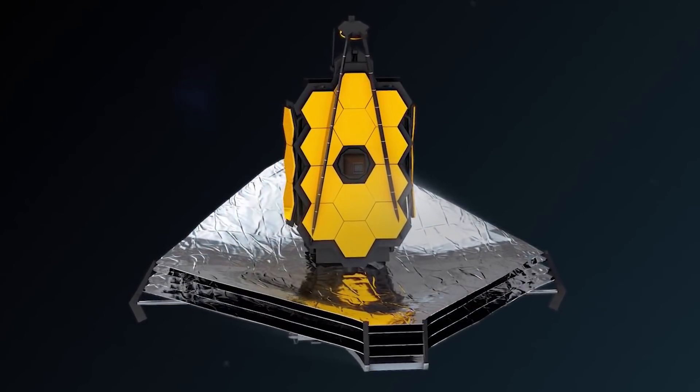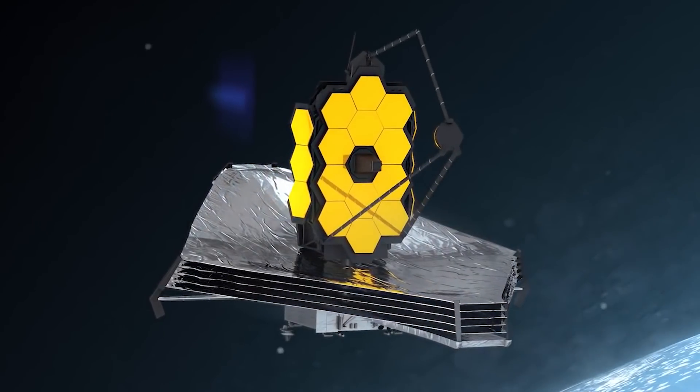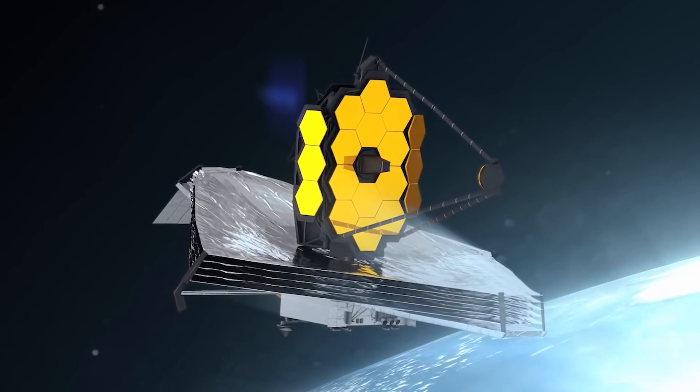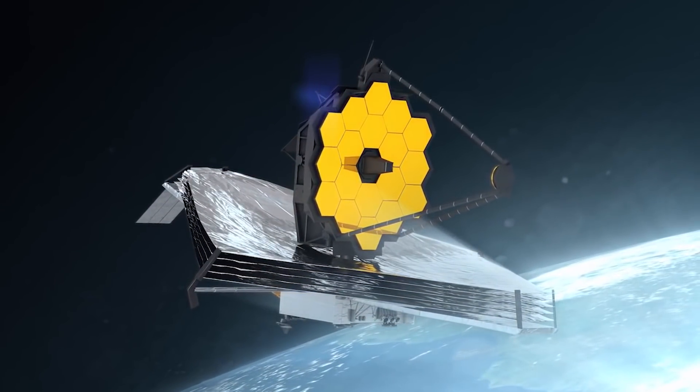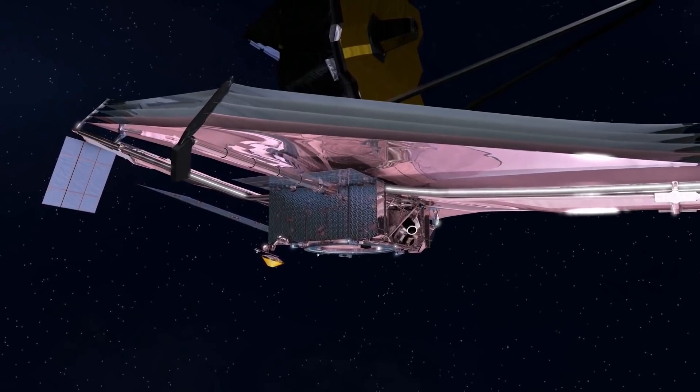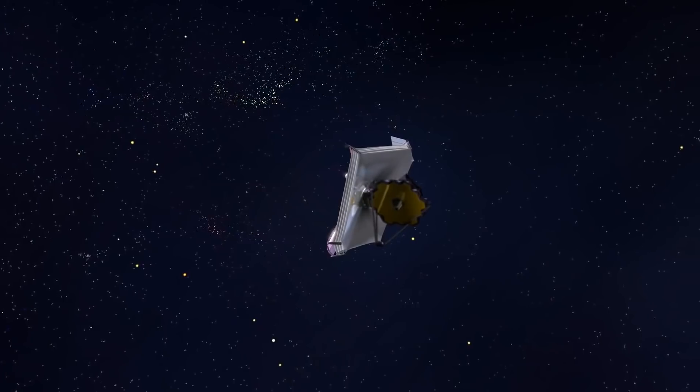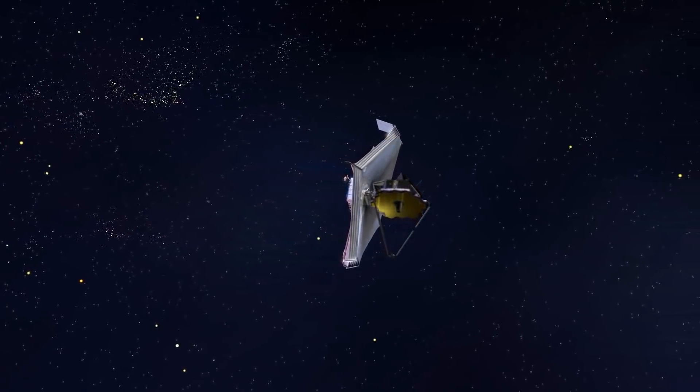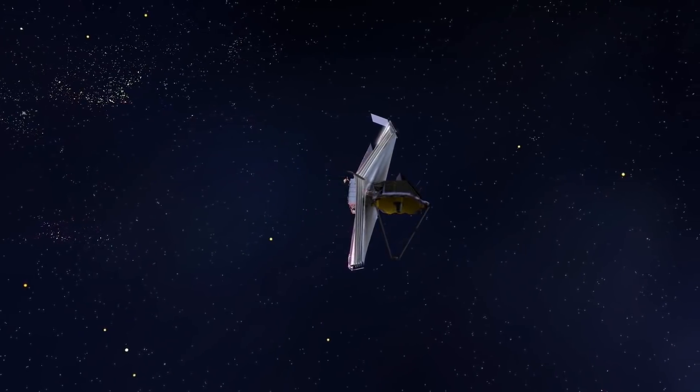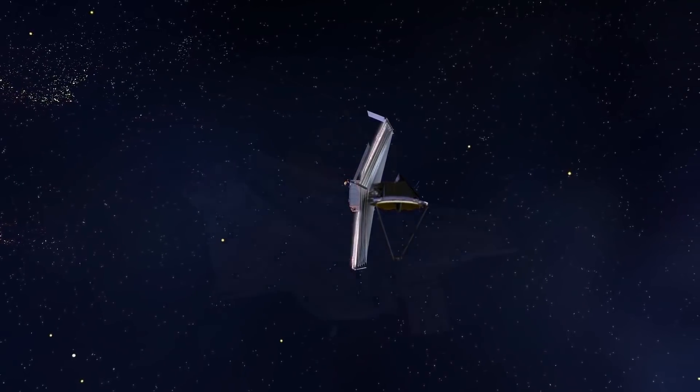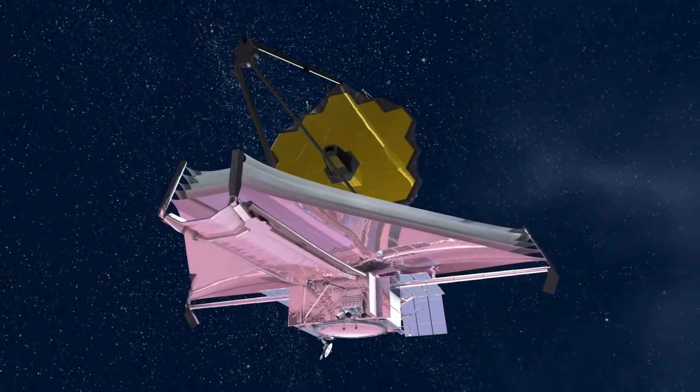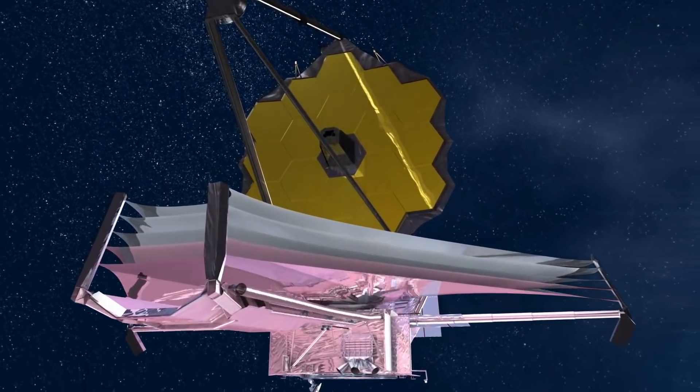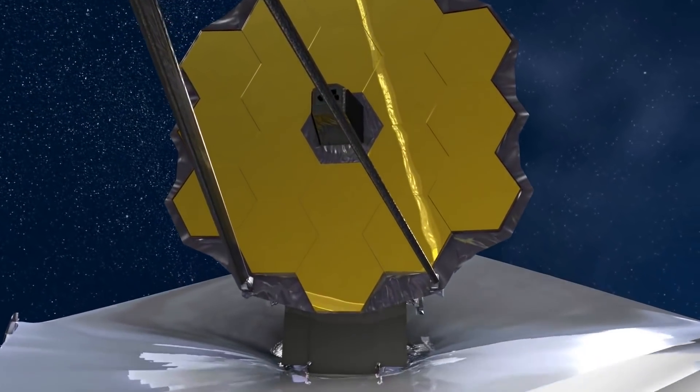Telescope deployment is complete. Ongoing cool-down and instrument turn-on continue. The telescope and scientific instruments started to cool rapidly in the shade of the sunshield once it was deployed, but it will take several weeks for them to cool all the way down and reach stable temperatures. This cool-down will be carefully controlled with strategically placed electric heater strips. The remaining five months of commissioning will be all about aligning the optics and calibrating the scientific instruments.